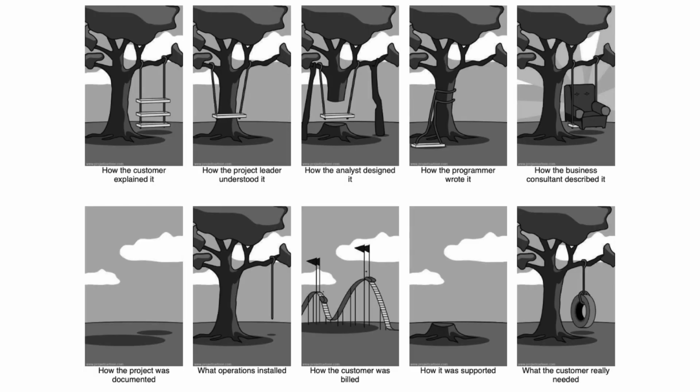We said this at the very beginning. Prototyping is kind of a reaction to the system development lifecycle, and it basically challenged the number one assumption of the system development lifecycle, which is that it's possible to clearly estimate budget, time, and requirements for a complex information system project. Prototyping, an agile approach, basically says that's just not possible. So instead of fighting this difficulty, let's embrace it. Let's create flexibility in the process.